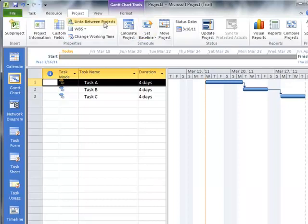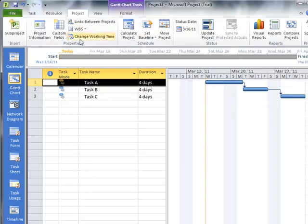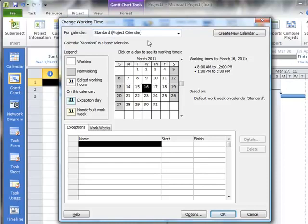What we're going to do here is we're going to go to Project, and then Change Working Time. This is where we can make exceptions or alterations to our calendar. We can change the standard calendar, or we might want to create a new calendar. That way, we can create our own customizations, and we could be able to move that calendar back and forth between different projects, or create a file that we could use as a template for future projects as well.